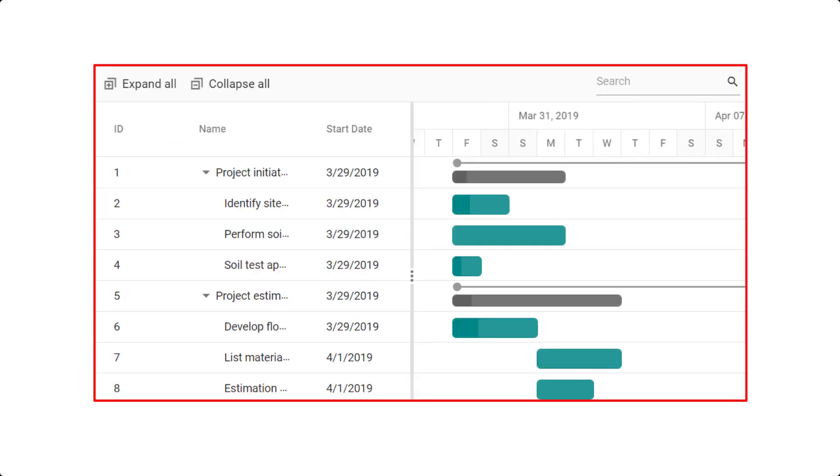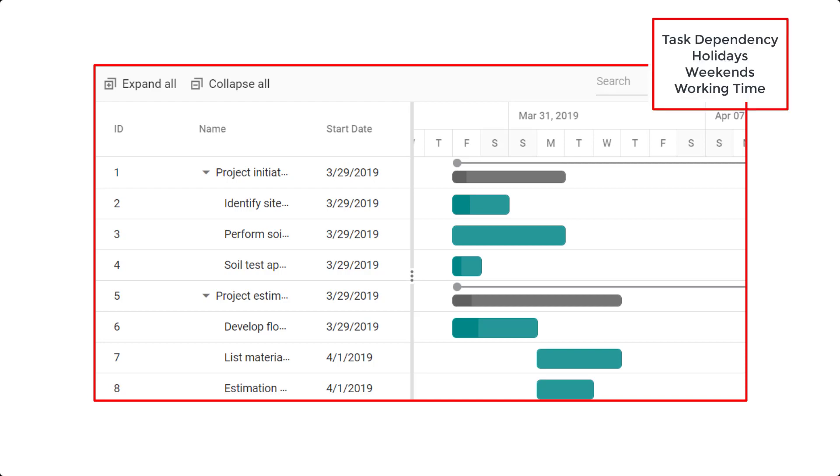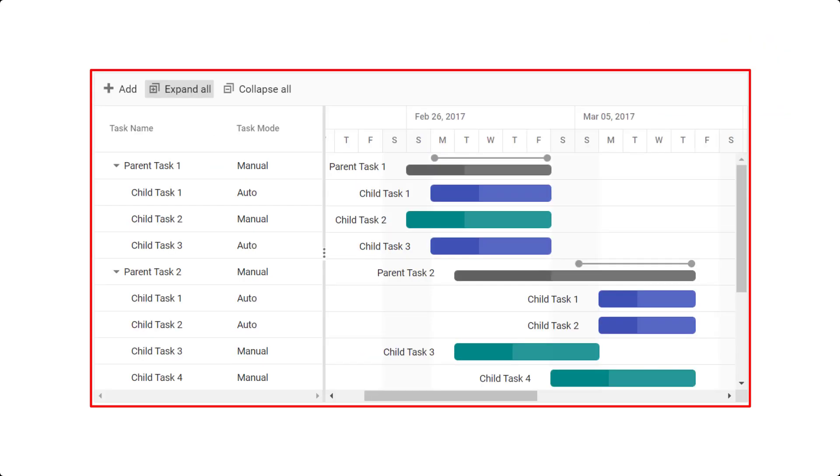When the task scheduling mode is set to manual, the start and end dates are scheduled based on the data source without automatic validation for factors such as task dependencies, holidays, weekends, and working time. When the scheduling mode is set to custom,